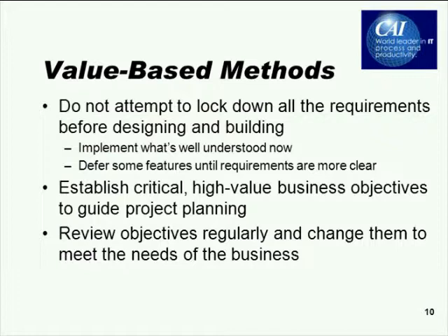Value-based methods seek to establish high-value-based business objectives at the start of the project and to plan the project based on those objectives. So lesser value objectives are not considered in the initial planning, but during the project, the stakeholders review the objectives regularly to see if they're still considered highly valued, and they're changed if needed.